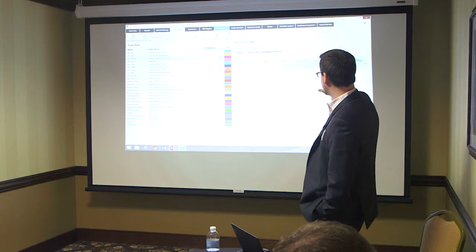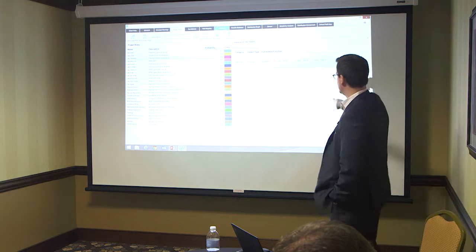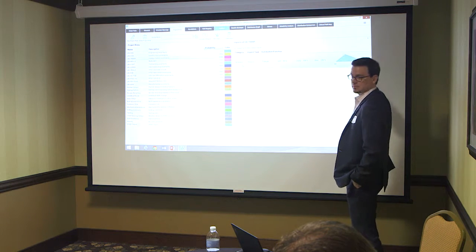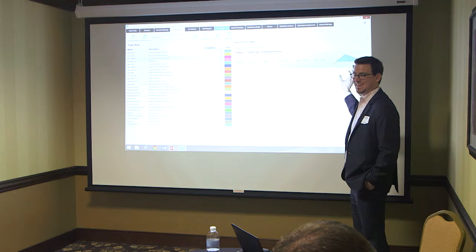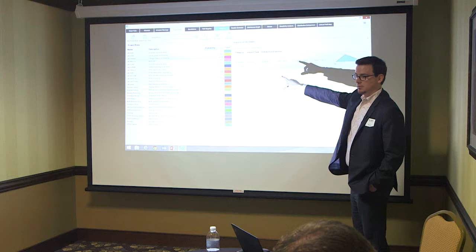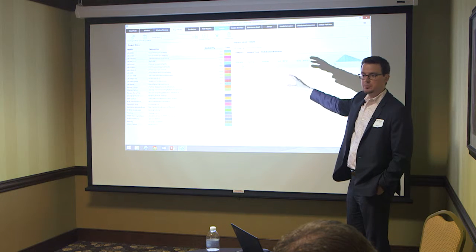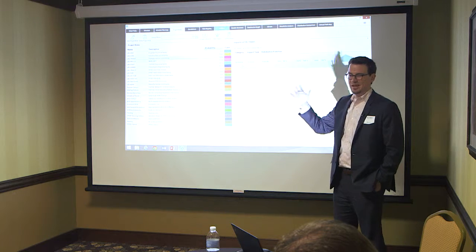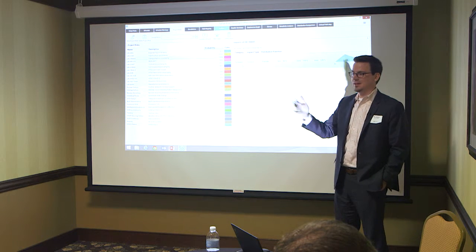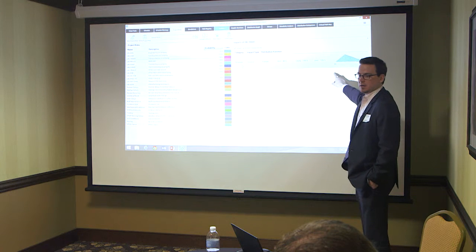The impact types, this is where we've changed. We capture relative impacts, which you can see here are percentage based. So this is allowing me to scale the duration of the activity. The uncertainty in this one, one of the key challenges we had, it's always been a challenge, is how do I model an opportunity? Or how do I model a risk that's an opportunity and a risk? Because everything's not cut and dry, it's not black and white. I've got it covered here.